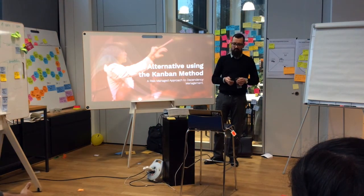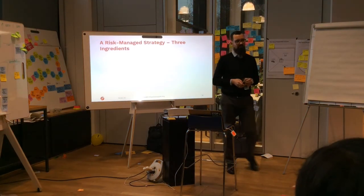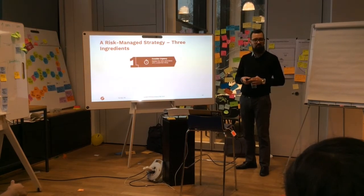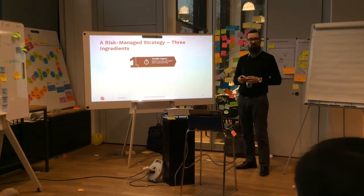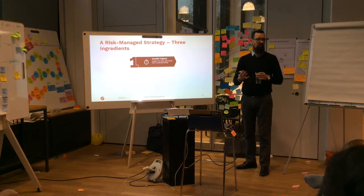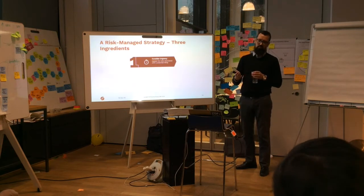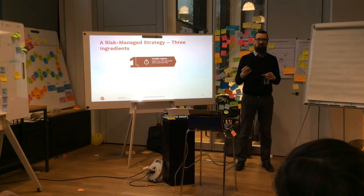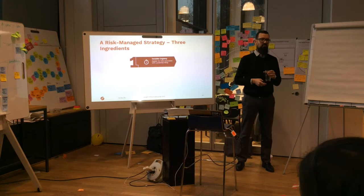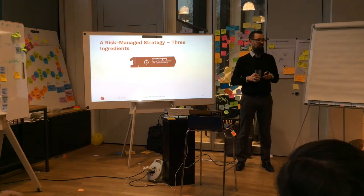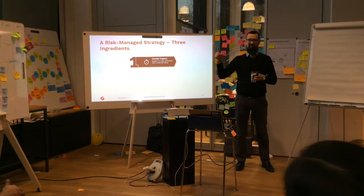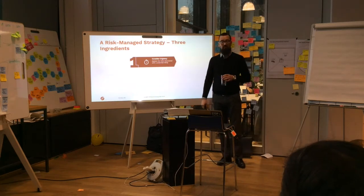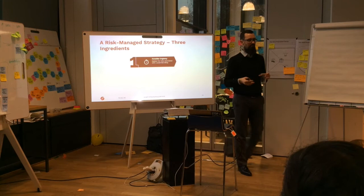Let's look at the alternative - the risk-managed approach from Kanban. There are three ingredients. First, determine your urgency - the urgency of the stuff you do. You need something customer-recognizable: the customer looks at it and says 'I want this in that timeframe.' Or there's risk - like GDPR, which was a good example. Something was not urgent, then suddenly became extremely urgent. You need to determine the urgency and the risk associated with your product feature or item.